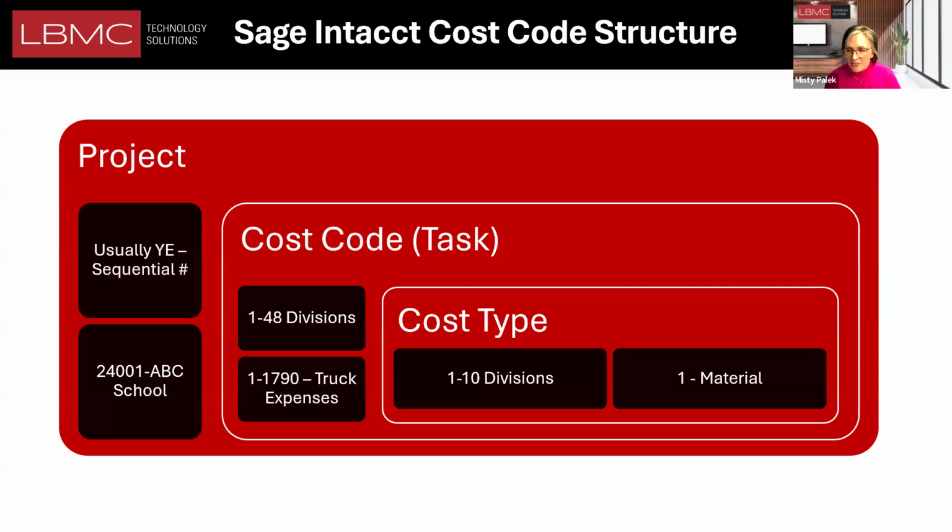Also, many times the schedule of values that you use for progress billing has the same structure, because if it is what's called cost plus billing, you're going to list out your schedule of values, which matches your budget. It's just selling amount versus cost amount, right? Your budget is just cost, and your proposal or your contract is the selling amount. But often they reflect each other. So that means that your schedule of values might match your budget based on this work breakdown structure.